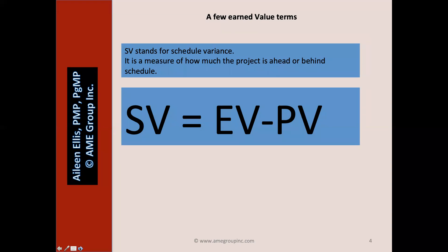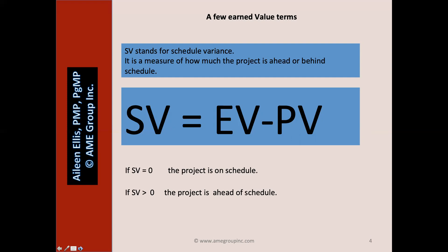SV stands for schedule variance. It is a measure of how much the project is ahead or behind schedule. The equation is: Schedule variance equals EV (earned value) minus PV (planned value). If schedule variance equals zero, there is no variance — the project is on schedule. If the schedule variance is a positive number, we are ahead of schedule; the work complete is greater than the work scheduled. If SV is less than zero, it means the project is behind schedule; the work complete is less than the work scheduled.